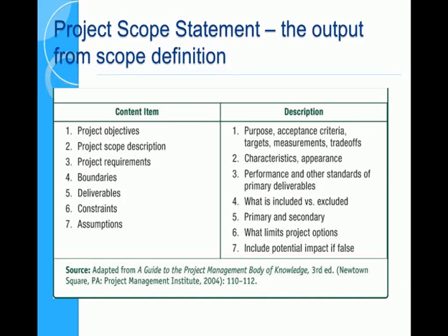And finally, things that we believe to hold true but may not. So assumptions are things that we believe to hold true, and in which case, for the example we gave, that all materials could be sourced readily by Anu and his dad, but it's possible they don't hold true, in which case they come out of the assumption bucket and into the risk bucket. So you might hear this in any decision making: we need to challenge the assumptions.